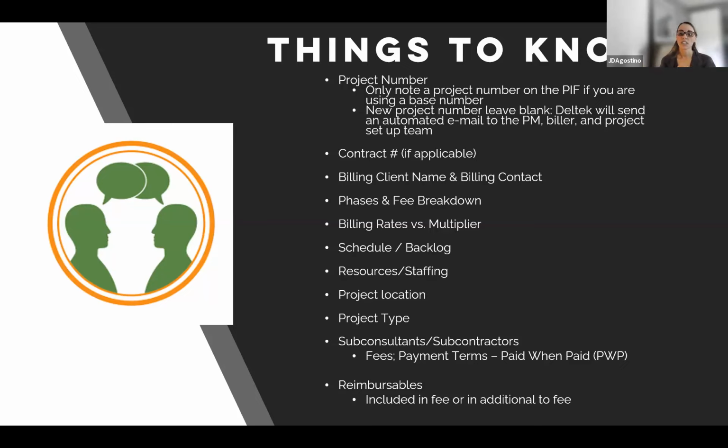Subconsultants and subcontractors. So having or setting the tone for their fees and for their payment terms. I know Sue mentioned this, like getting a signed contract, making sure that their signed contract has payment terms of paid when paid. If they're anything different, you need to get it approved by Stacy Fries or Rob Pepe.